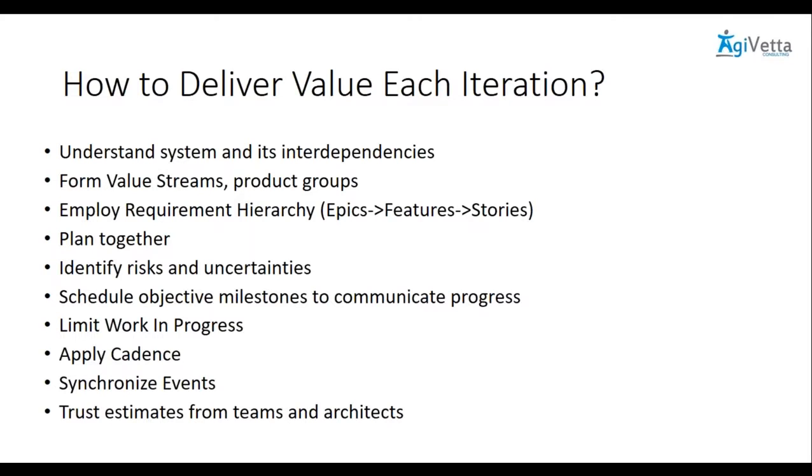That means all teams plan on the same day. They start the sprint on the same day, end the sprint on the same day, do the demos. It's very challenging. I've seen that, practiced it, experimented it. Very challenging to be able to attend all the demos. But what is beneficial, on the positive side, is they end at the same time.